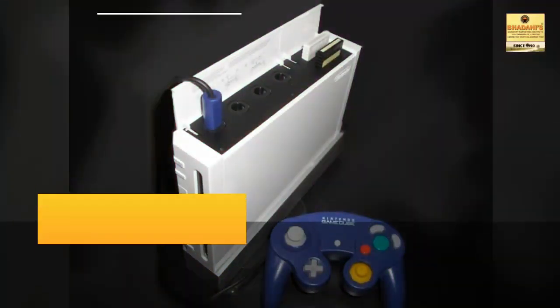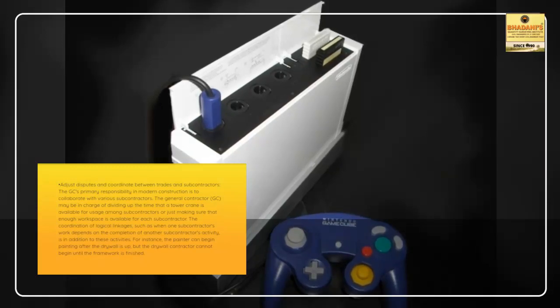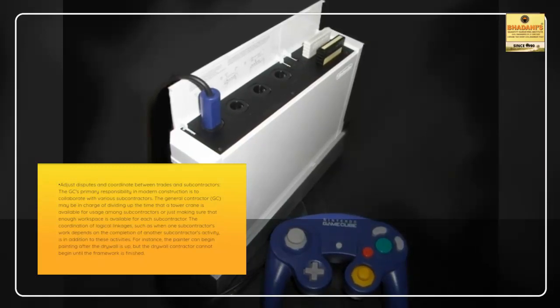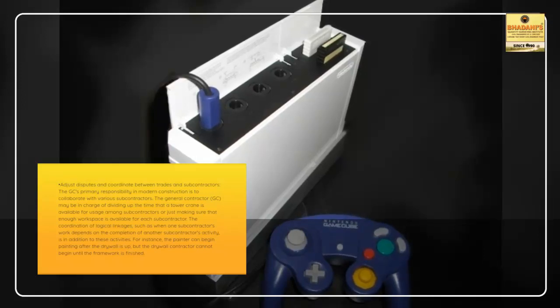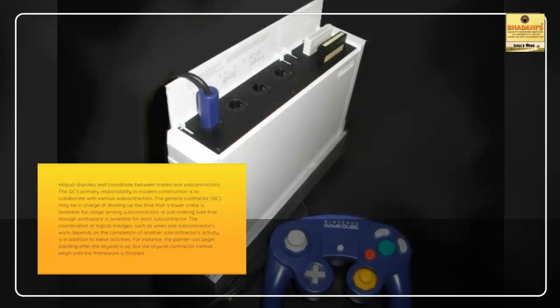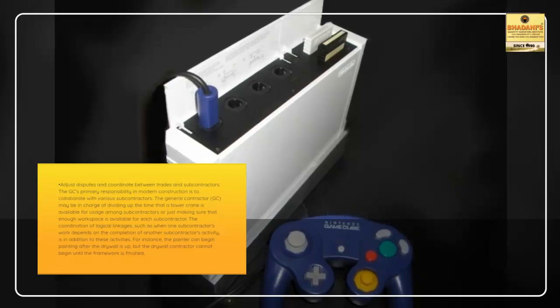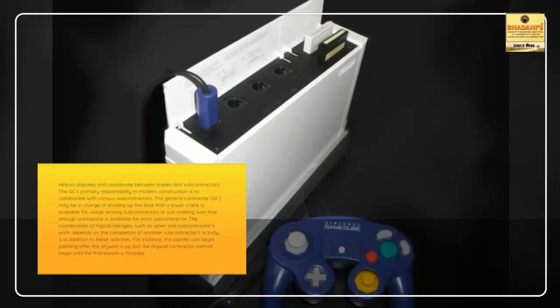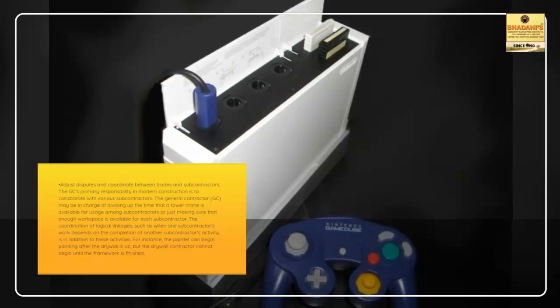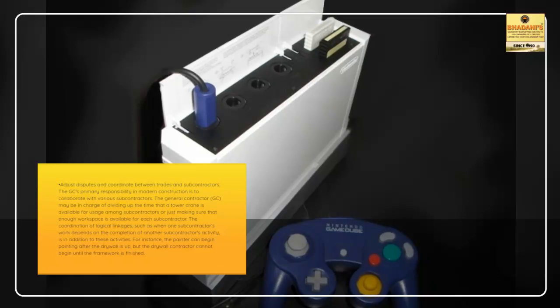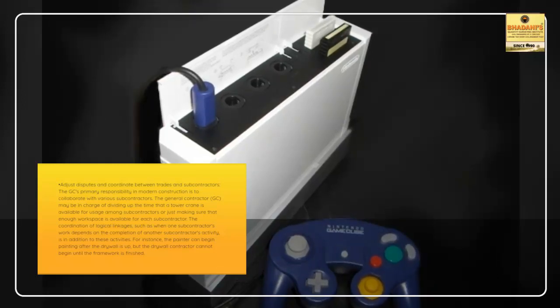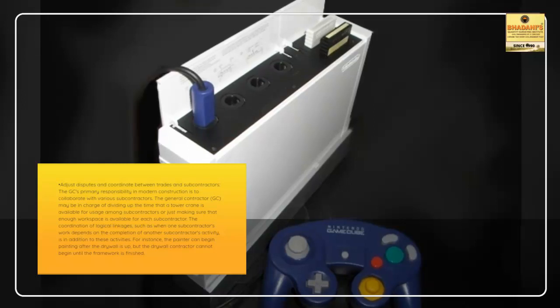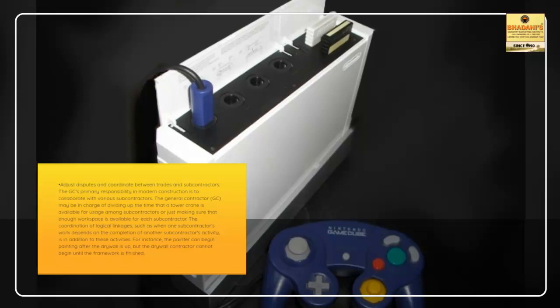Adjust disputes and coordinate between trades and subcontractors. The GC's primary responsibility in modern construction is to collaborate with various subcontractors. The general contractor, GC, may be in charge of dividing up the time that a tower crane is available for usage among subcontractors or just making sure that enough workspace is available for each subcontractor. The coordination of logical linkages, such as when one subcontractor's work depends on the completion of another subcontractor's activity, is in addition to these activities.